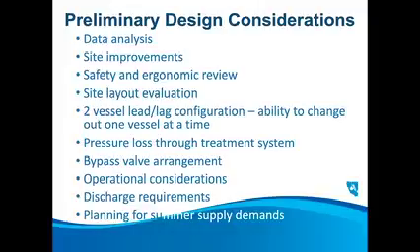And then there were also, of course, operational considerations, discharge requirements, and then planning for summer demand. So our schedule was designed to get the majority of our critical facilities up before late spring, so that we had our sources ready to go for summer demand.